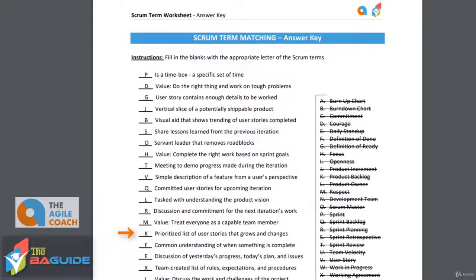Next is a prioritized list of user stories that grows and changes. And this is the product backlog. The key things here are that it's a prioritized list — the highest priority items are at the top — and that it's going to grow and change as the project goes on. That's the point of being agile: we need to adapt to new user stories and adjust current ones to help meet the needs of the business.